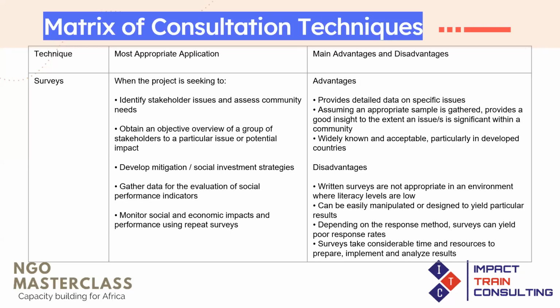Even in Nigeria, surveys are widely accepted and they are easy to use. The disadvantage is that written surveys are not appropriate in an environment where literacy levels are low. So in most of our rural communities where people cannot read, it may be difficult to carry out surveys. And surveys can be easily manipulated or designed to produce particular results. And depending on the response method, surveys can yield poor response rates.